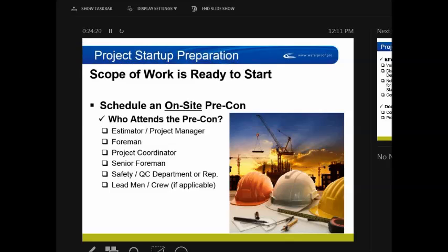because there are a lot of considerations outside of paperwork. You've got safety considerations, and you've got installation issues that you run into that aren't shown on the details or the plans, which always comes up. So we need to make sure these pre-cons are held on site. And if you cannot hold it on site, then please notify someone. This is all about the foreman. Project managers bid a job, the work goes to the operations department, and then you guys are the ones in the field that install it. So we want to make sure we're communicating all the information to you.